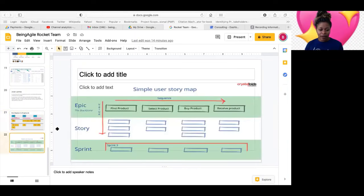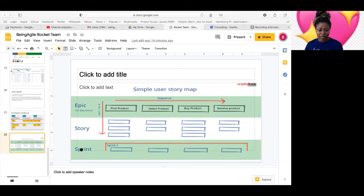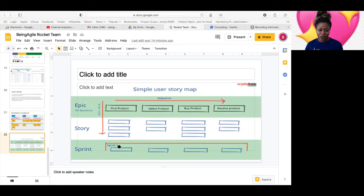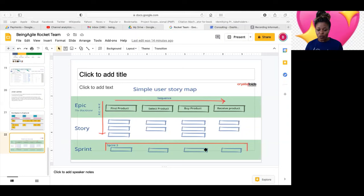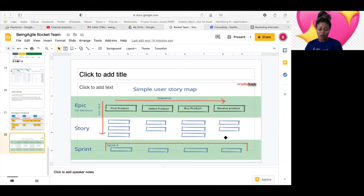And then looking at this one, all of what we just saw in this slide 21 here, I just added this just to help you see how it boils down into the sprints. So now in sprint one, you're saying that all of these stories here, you want to do them in sprint one. And then eventually after sprints, let's assume that this was sprint one, sprint two, sprint three, sprint four, you now have the release. Let's say you release every four sprints, for example, we now have everything you want to release.